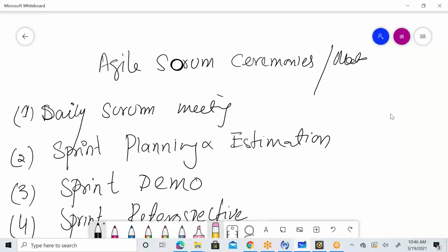Yes. So when you say the engine is an epic, which is not going to be done in one sprint. Epic means a major effort, a major part, which cannot be done in one sprint. That means the engine can be done in maybe 3 sprints or 4 sprints. Now within which sprint they want to make the change, that is the question. It is not going to impact the whole engine. Your epics are going to be broken down into smaller user stories, and then they will be done.